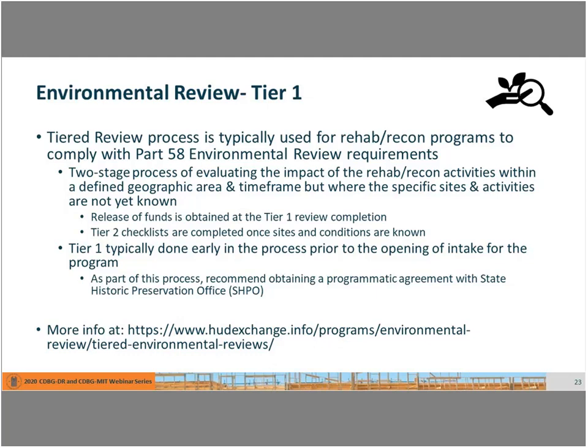What you can't do is eliminate or speak to some of the conditions that are specific to a site, which will include things like historic preservation because you don't know where the house is, much less when it was built, or the neighborhood that it's in. You may or may not know about, for example, gas tanks, noise, and some of those other items that are very locational specific. So you can clear some broad items at the Tier 1, complete the checklist, create a Tier 2 checklist. That Tier 2 checklist will have those outstanding items that need to be checked upon site-specific review. And you can obtain clearance.